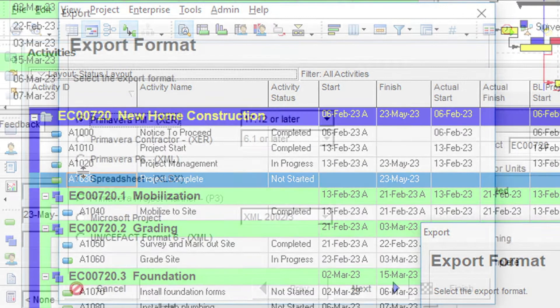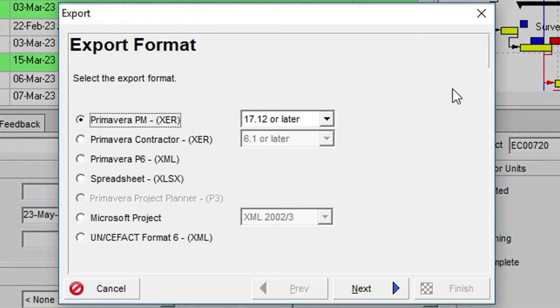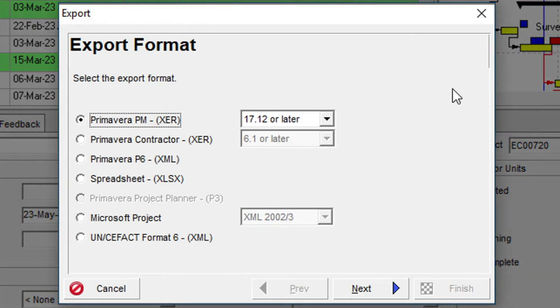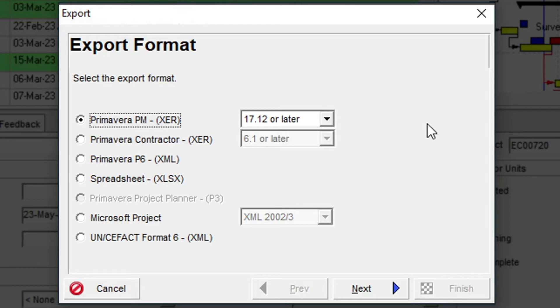The Export dialog is a wizard that will help you export the project data in the format you require. The first option is to export in the native Primavera PM XER format. This has been a standard way of sharing data among P6 users for many years and is a popular format used by P6 schedulers.